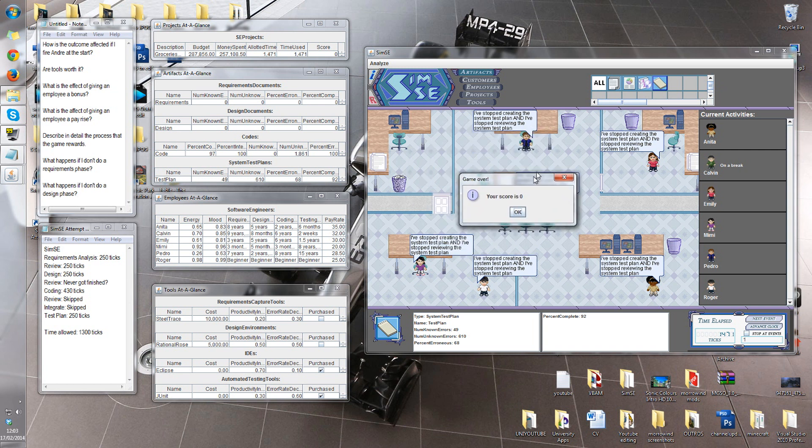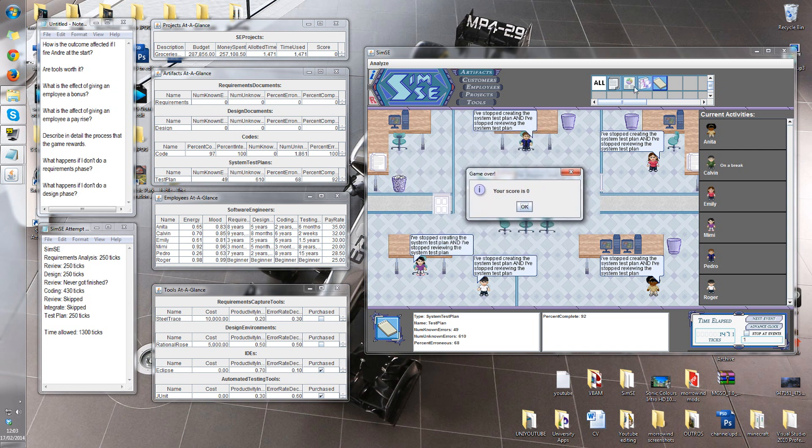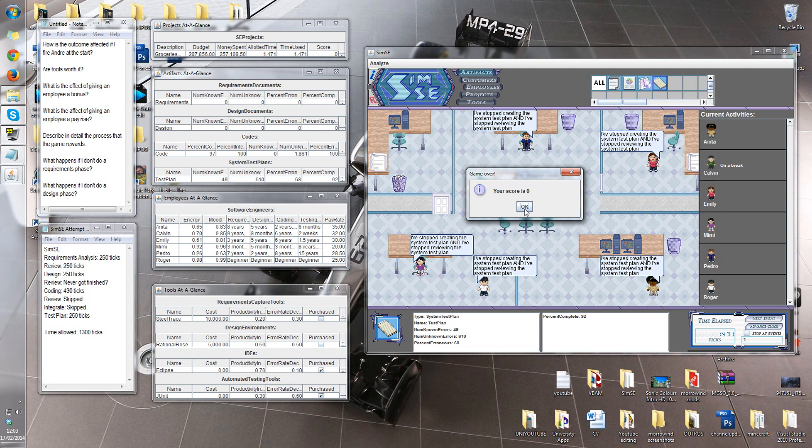What happens if you don't do the requirements phase or the design phase? This. Because we've not really thought about what the client actually wants. We've not thought about how we're actually going to build it. We've just told all these guys to go out and build something, whatever they want. No requirements specification, no design specification. They've probably all gone off and done their own thing. And we've probably built a tree house or something rather than a shopping website.